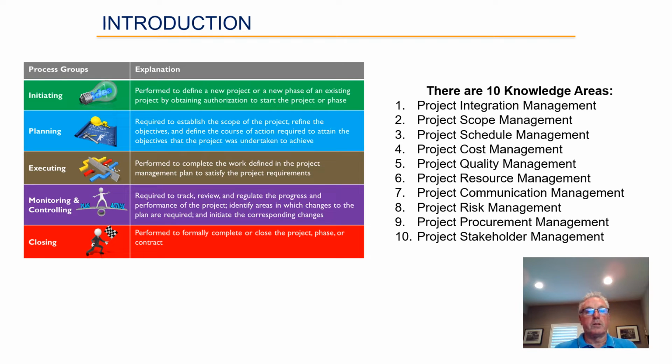It's where change requests will come. It's where you'll process those change requests. If those change requests cost more money from the customer, it's where you go to the customer and do a cost-benefit analysis and see if maybe we need to get a little bit more funding to implement this change. Is this change necessary? What are the risks if we do this change? What are the risks if we don't do this change? So we're going to dig into that quite a bit deeper as we get through our training process.